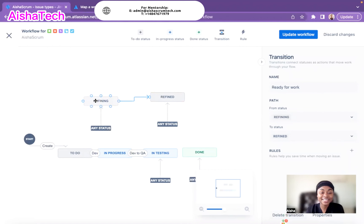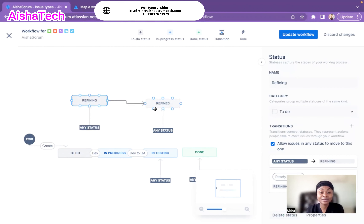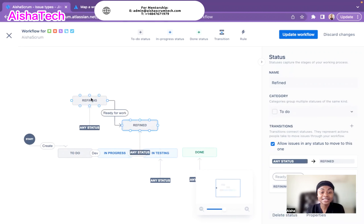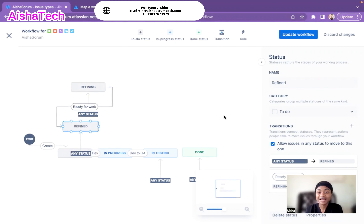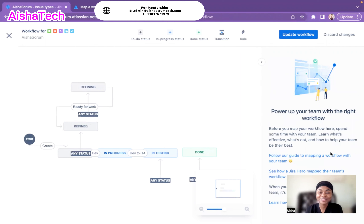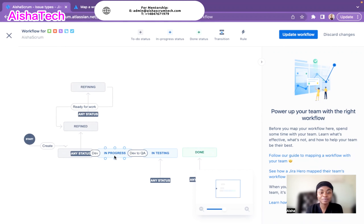Now I have my Jira workflow created. I first created the Refining status, then the Refined status, and linked them with the transition 'Ready Forward.' I can also create a transition from Refined back to to-do. Let's say I want a transition from Refined to to-do — I click on the transition at the top, select from Refined to to-do, and call it 'Selected for Development,' then hit Create.